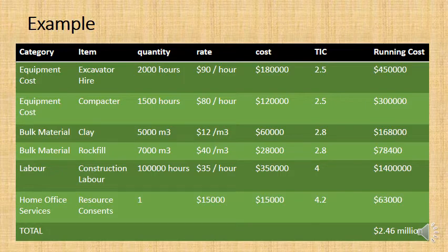And the total installed cost factors have been developed from looking at previous projects of similar type. Now, if we were going to do an itemized estimate where we are trying to find quantities and prices and rates for every single item of a project, well, I can tell you for a dam similar to the one you're building in Colorado, you're going to have hundreds, even thousands, even tens of thousands of items.